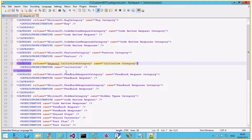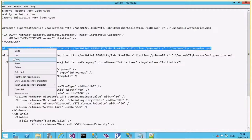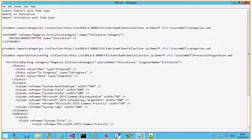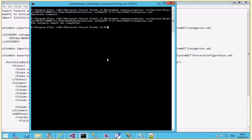Now let me import the updated categories.xml. The command is: witadmin importcategories, specifying the collection, team project, and the categories.xml file. One important note: the work item type must already exist in the team project before importing the categories file. If you haven't imported the Initiative work item type yet and try to import categories, you'll get an error saying the category refers to a work item that doesn't exist. Let me hit Enter — the category is imported.